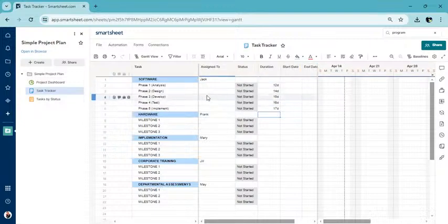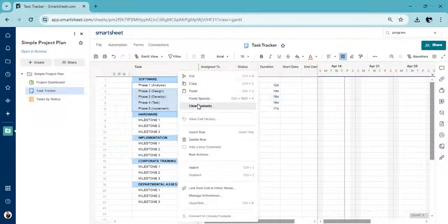The next thing you want to do is determine if these phases are tied to each other or if they can run in parallel individually. Sometimes they could, but it doesn't make sense to do it like that because you have constrained resources. If your resources are constrained and you need to do it in a waterfall fashion, then you know what to do. You got to link them. All right, so let's link them.